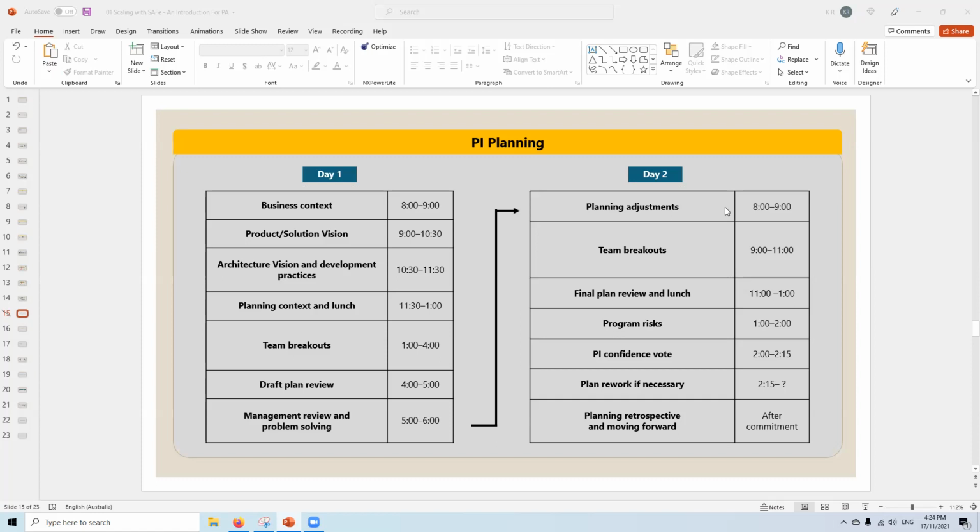Thank you. The question here says, in a sprint, 3 teams work on 3 separate requirements. They must integrate during review. Who tests that the 3 requirements will work together or not? Okay, right. So if you are integrating, whether you are taking input or providing input, you are either sending data or receiving data or doing both. Whatever you're responsible for, you test that. If you're responsible for sending the data, you test that part, and whichever team is responsible for receiving the data, and the data sits nicely in their product or in their interface or in their UI page, whatever it might be, they'll do that testing.